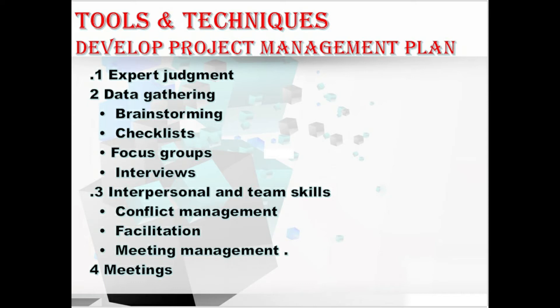We have data gathering techniques, which contain brainstorming, checklists, focus groups, and interviews. Brainstorming is frequently used when developing the project management plan to gather ideas and solutions about the project approach. A checklist may guide the project manager to develop the plan, or may help to verify that all the required information is included in the project management plan. Hope you understood about these techniques.